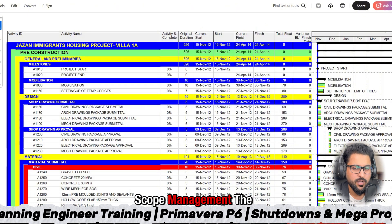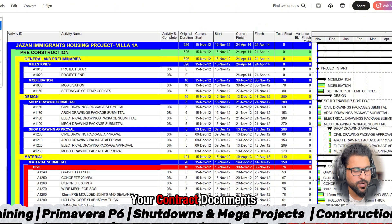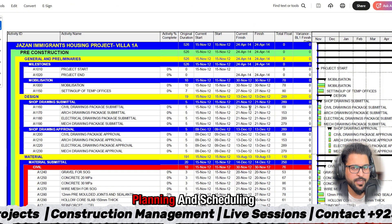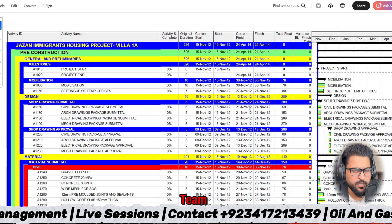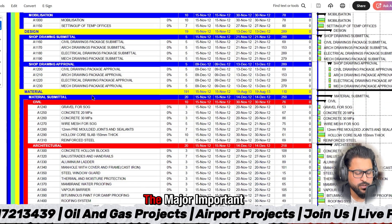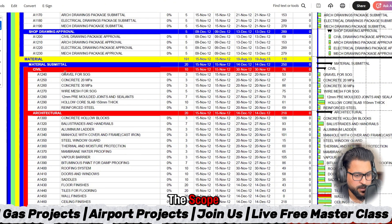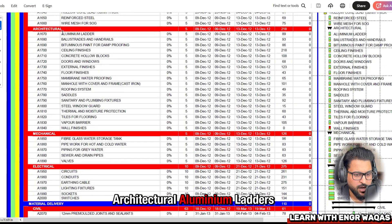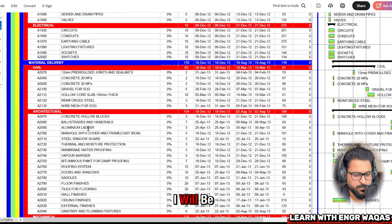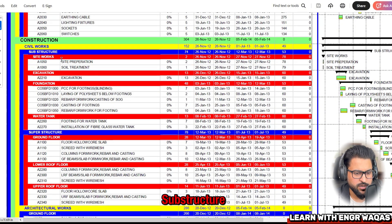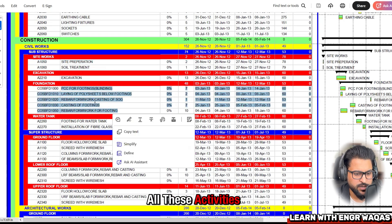Within Level 3 schedule, a planning engineer needs to understand scope management. The scope is taken from BOQ documents, contract documents, and design documents. The project is broken down into further parts by the project management team. Key activities include material submittals — architectural, aluminium, and others — and sub-structure work: site preparation, soil treatment, excavation, and foundation, executed step by step on site with defined logic.